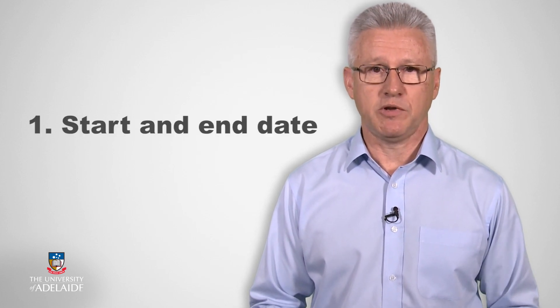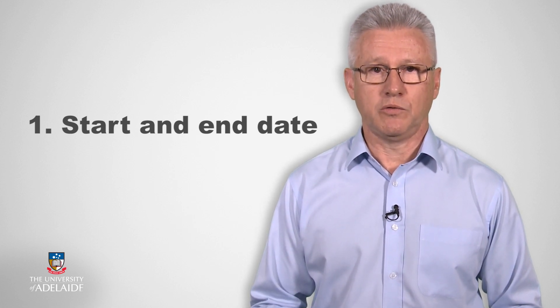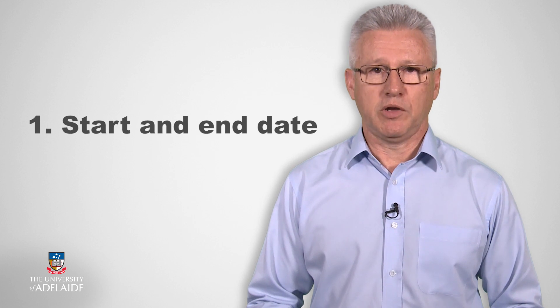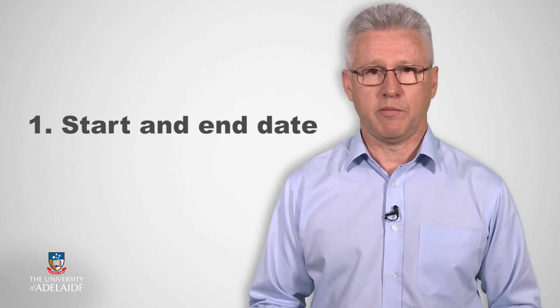Generally, there are four main characteristics of a project, regardless of its size and complexity. The first characteristic is that a project has a definite start and end date. It is a temporary undertaking within a fixed period of time, whether this is one week or six years. A project manager has to complete the project within the specified amount of time.